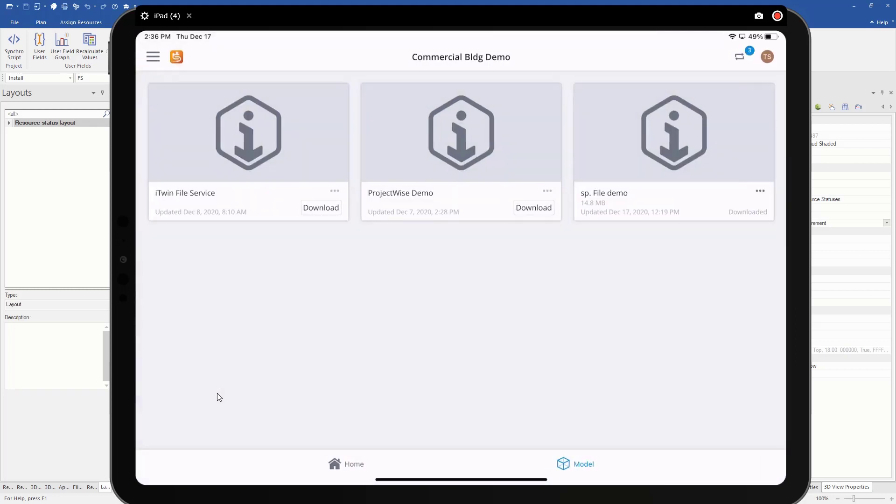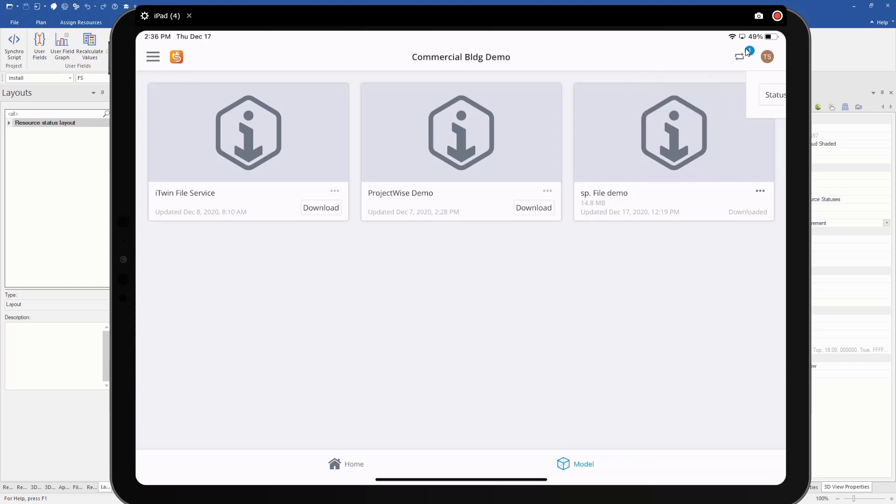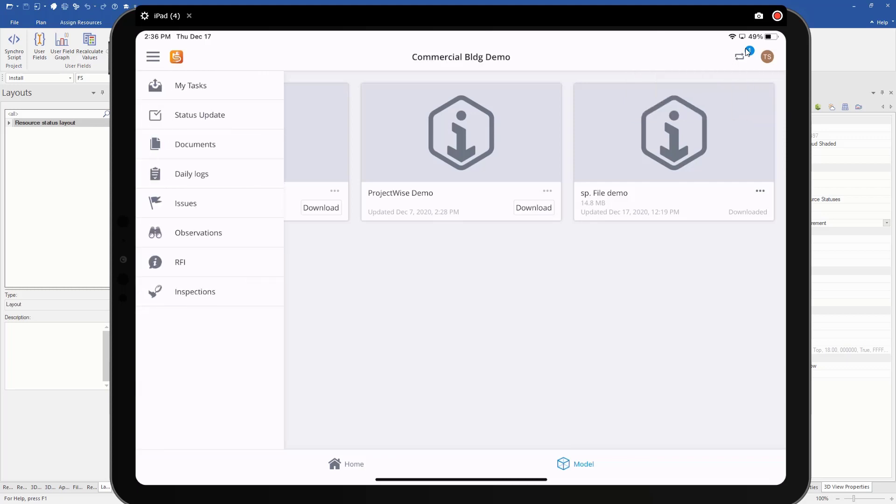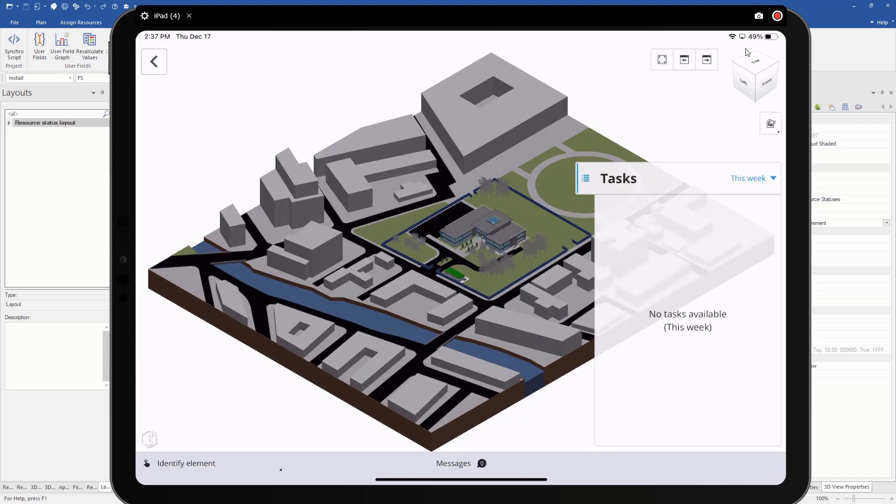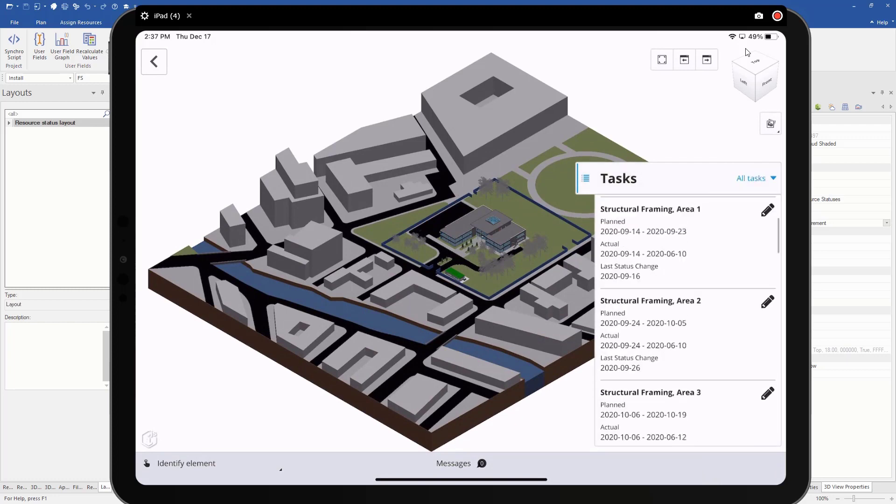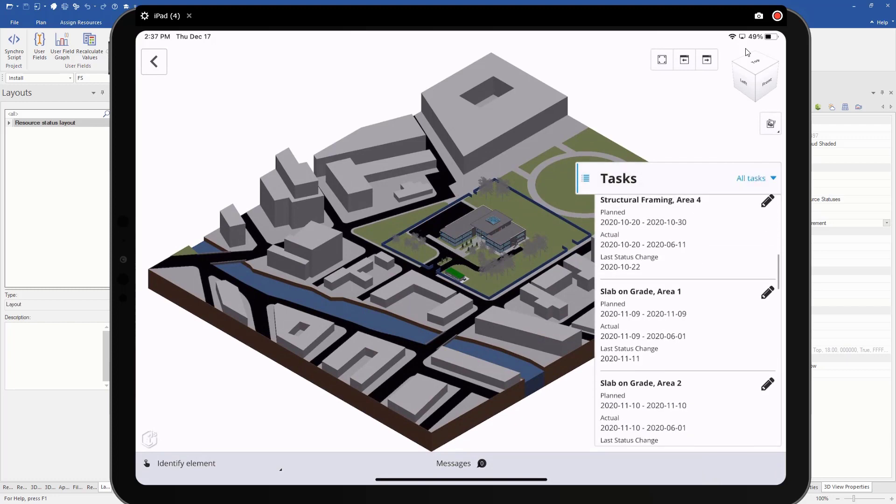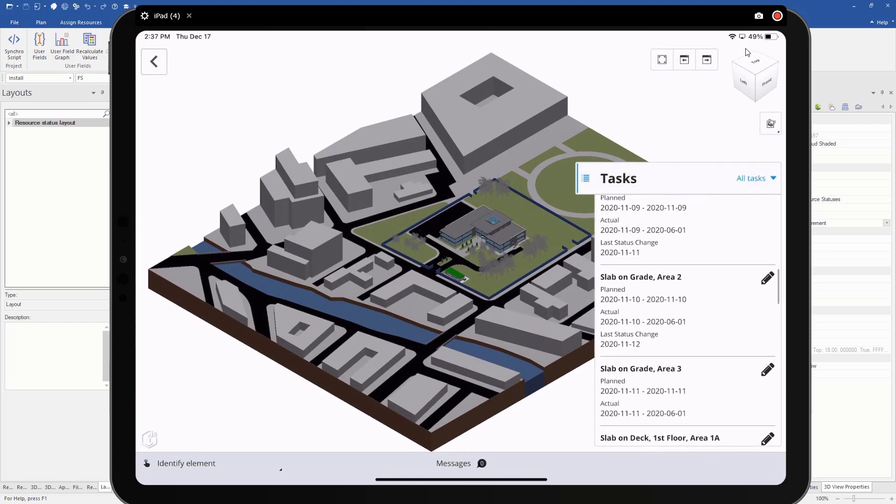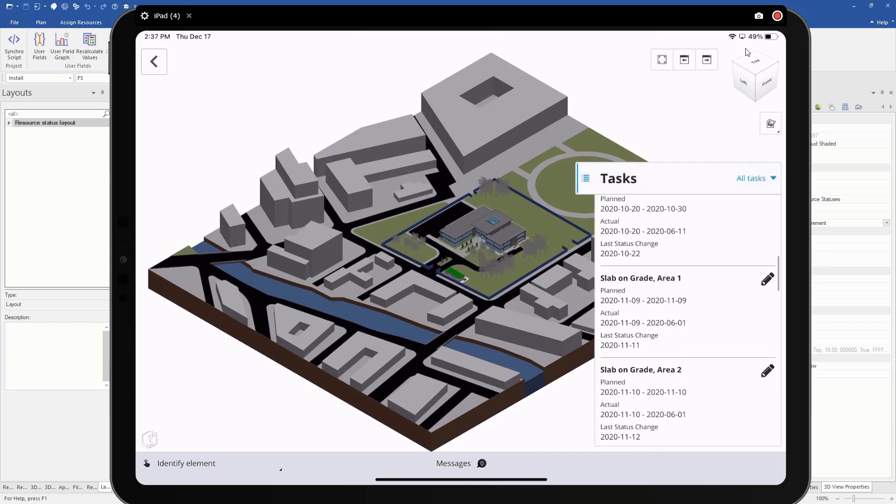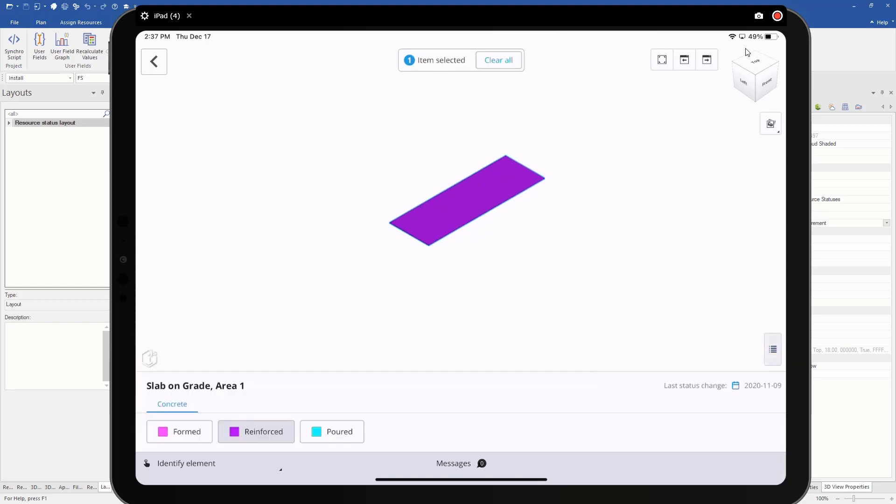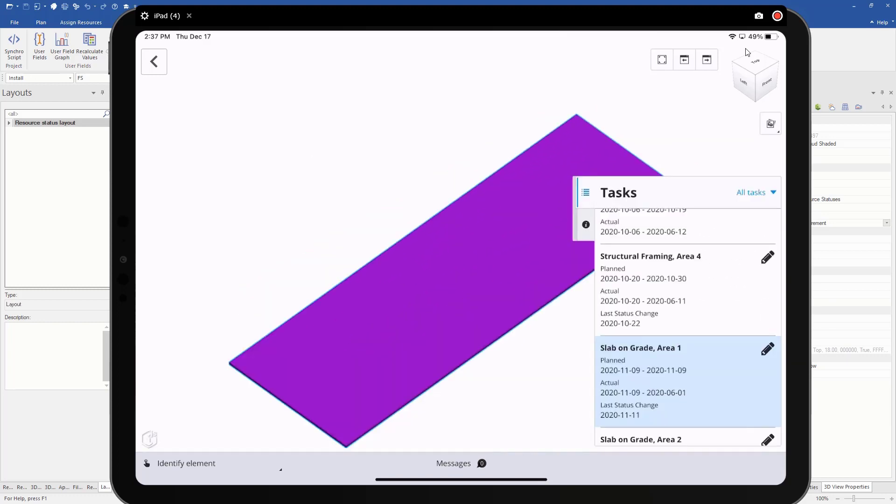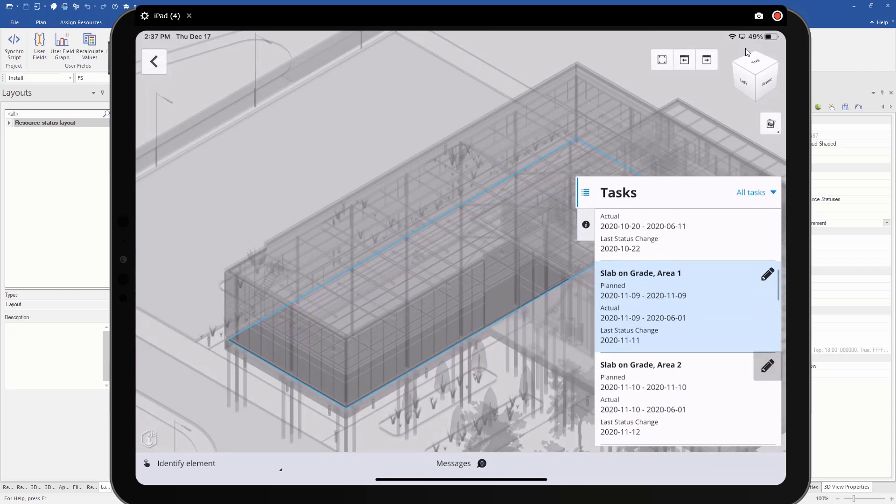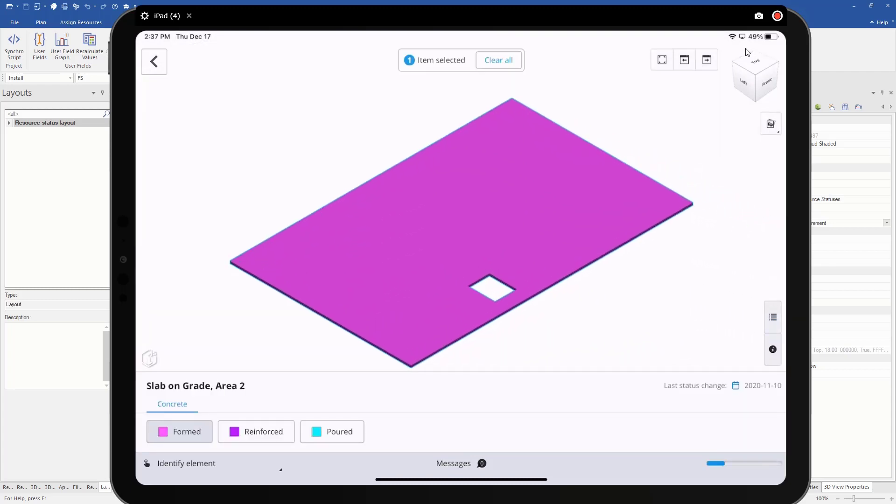Now you can see here it's asking me to sync. So I'm going to sync my statuses. Maybe while that's happening, let's go take a look at our concrete as well. So if we go slab on grade, there we go. We got the reinforce. So now we're going to say we moved on to area two, and now we've reinforced that as well.